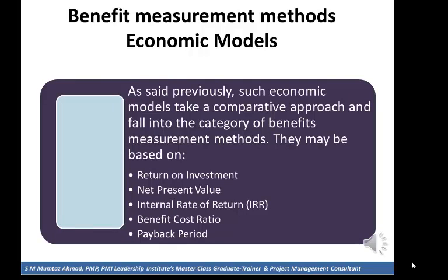Economic models for project selection. As noted previously, such economic models take a comparative approach and fall into the category of benefit measurement methods. They may be based on return on investment (ROI), net present value, internal rate of return (IRR), benefit cost ratio, payback period.